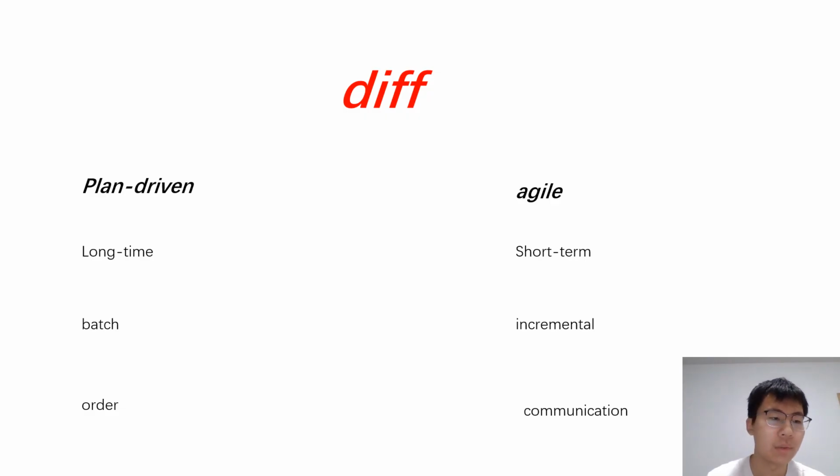And next we will look at the difference between plan-driven and agile. For plan-driven, for example the waterfall model, it goes through a lengthy planning process, which could take several months, followed by building the product, which again could take many months, and then testing the product, reviewing, and eventually deploying the product. There is lots of backstepping, and doing all of this can lead to lag times and many months to several years in order to get a product out the door.